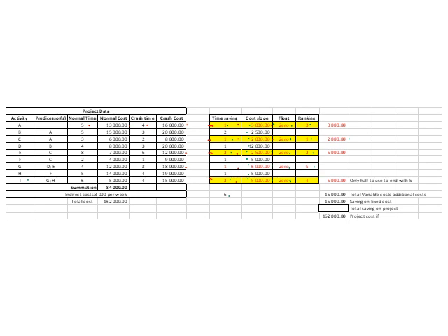Then on our second ranked item, we can save 2 weeks, which has a cost implication of 5,000 rand. On our third item, we can save 1 week again, and it has a cost implication of 3,000 rand.